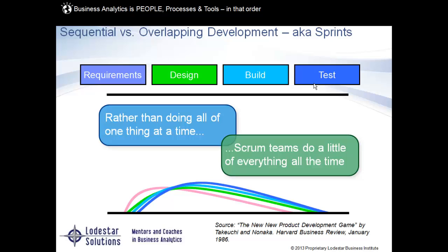So at the end of that period of time, I will have something done. Even if it's just a piece, it doesn't have to be everything. Everything's not going to be done in 2 weeks, but at least a piece will be done. If I have this massive project plan, I'm going to say, okay, this person's going to be on vacation. This person has another project that's going live, so I'm going to lose some time, and I'm available full time. So I think in these 2 weeks, I've got 8 working days. I think we can get this done in 8 working days.